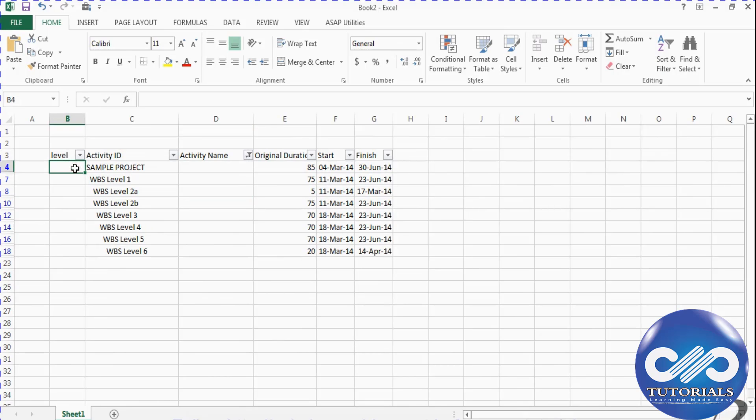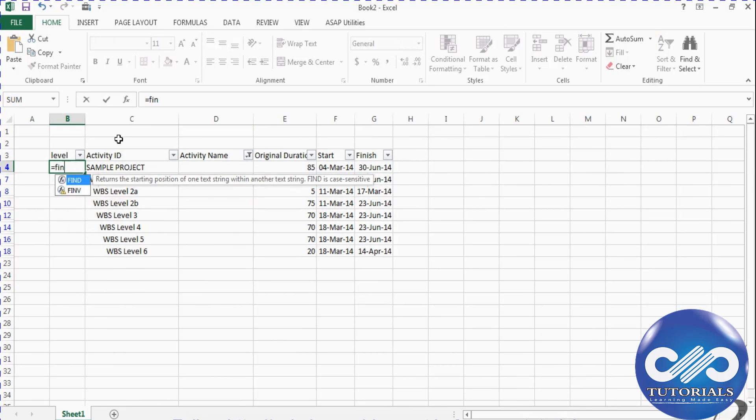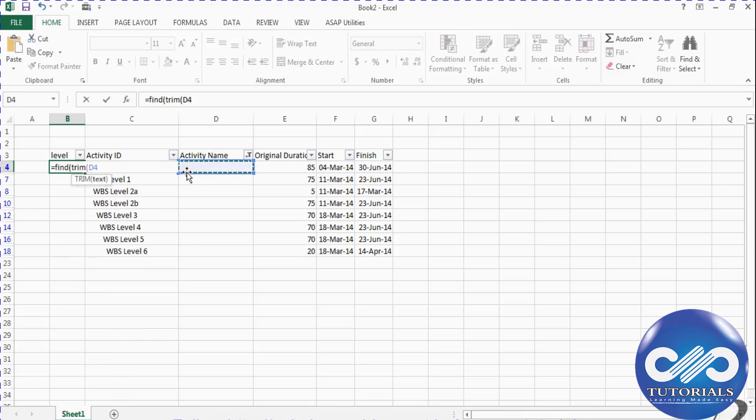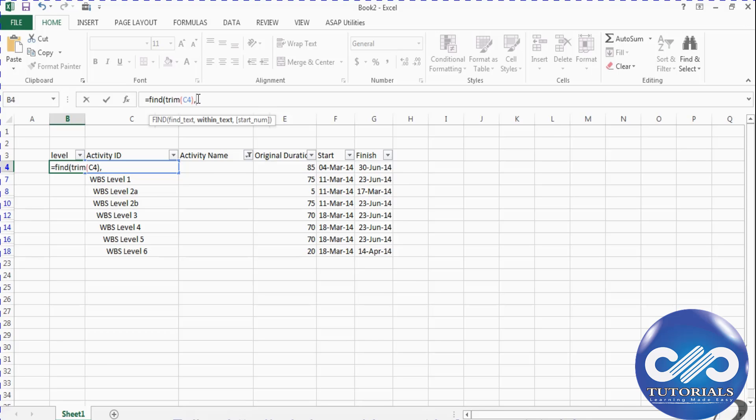To find the level of WBS item, we shall type a formula in this column called levels. That formula is trimming the WBS item, that is the exact WBS excluding the spaces. I will be finding this text in the entire WBS item. So this would give me the number of spaces.